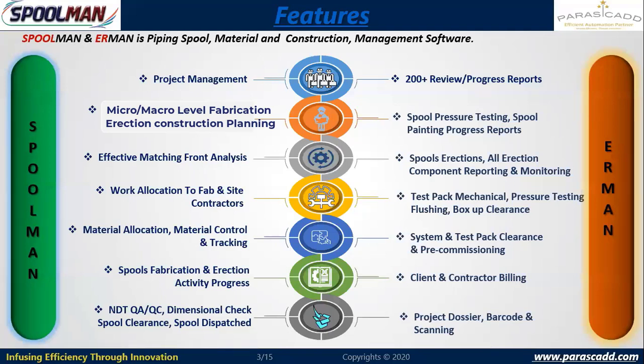And further, system will help us in making project dossier, like against a particular spool, what are all the fit up reports, welding report, NDT report, spool wise, line wise, complete line history sheet data and breakup reports will be available as documentation, and all these documentations will be a signed copy. System has provision to record and save the signed copy document. So I can sign a fit up report, welding report, attach it back into the system, so that the documentations are parallelly taking place in soft form within the system.